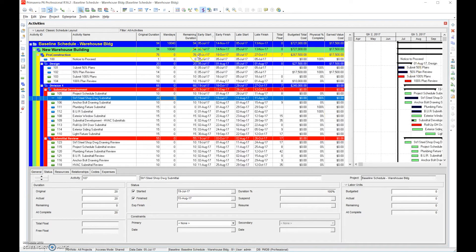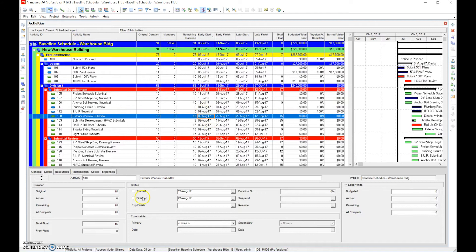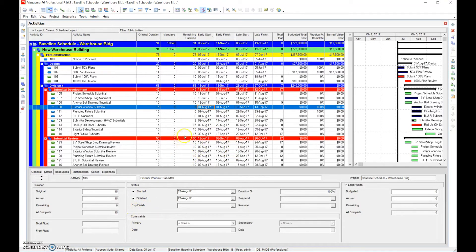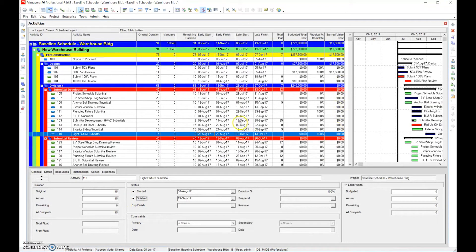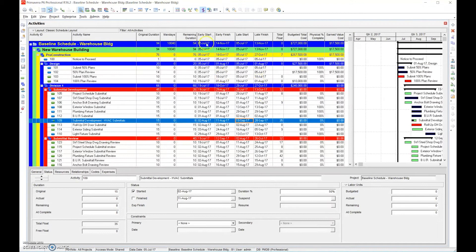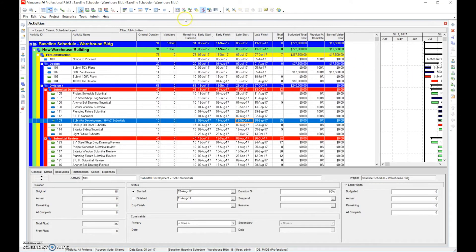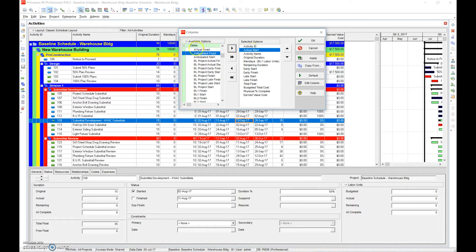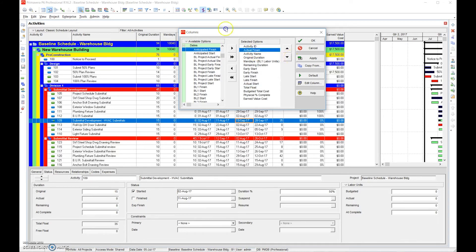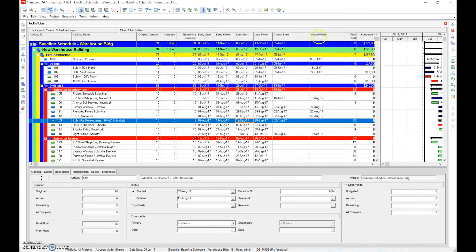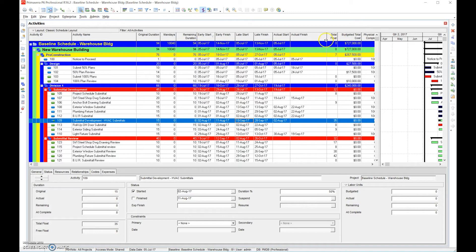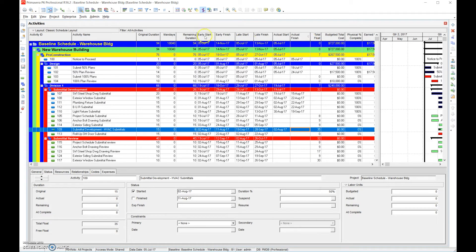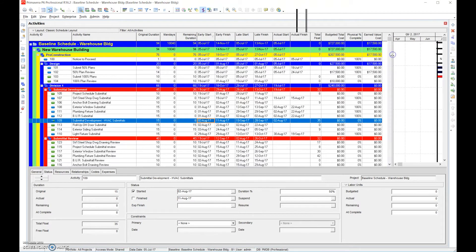The first thing we're going to do is go to every activity and update the start and completion dates, and put the percent complete in. Once we get that all done, we've successfully updated all the percentages, dates, actual starts, and actual finishes. We noticed we're missing an Actual Start and Actual Finish column, so go to Dates, add Actual Start and Actual Finish, and place them after Late Start and Late Finish. Resize the columns as needed, and make sure everything is sorted by Early Start.